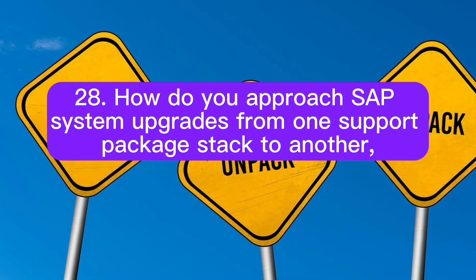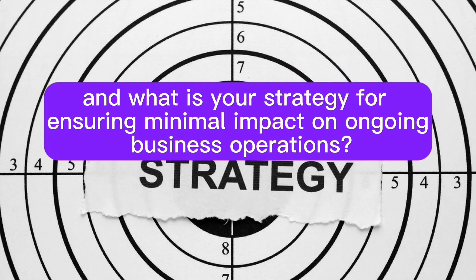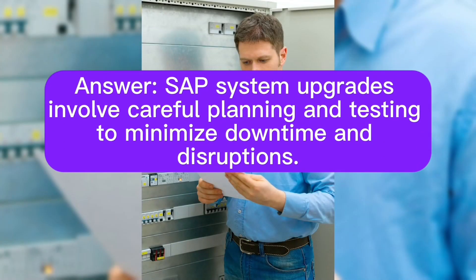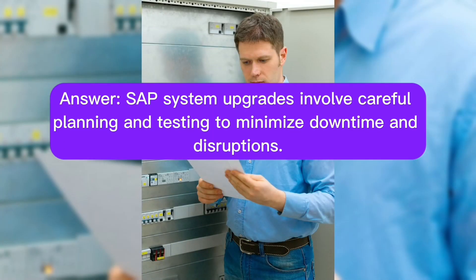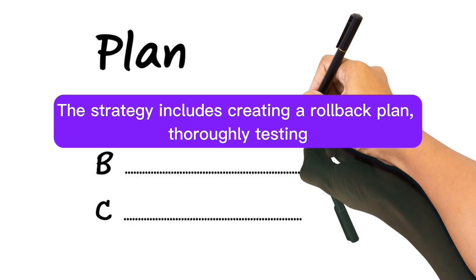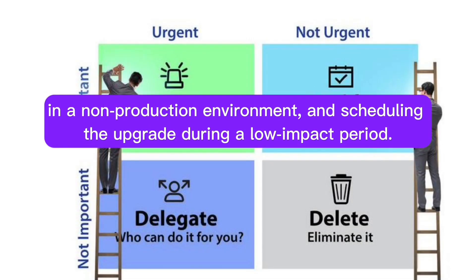Question 28: How do you approach SAP system upgrades from one support package stack to another, and what is your strategy for ensuring minimal impact on ongoing business operations? Answer: SAP system upgrades involve careful planning and testing to minimize downtime and disruptions. The strategy includes creating a rollback plan, thoroughly testing in a non-production environment, and scheduling the upgrade during a low-impact period.